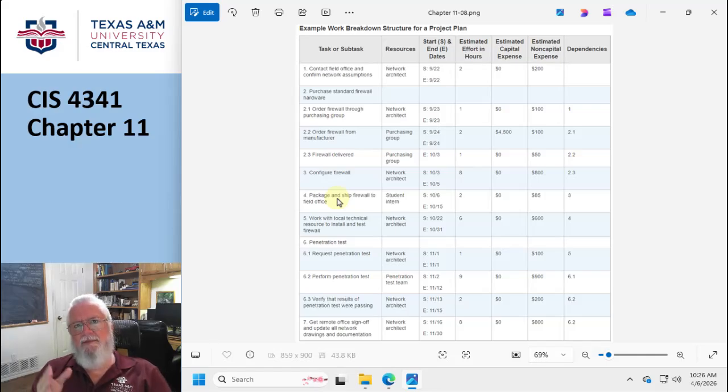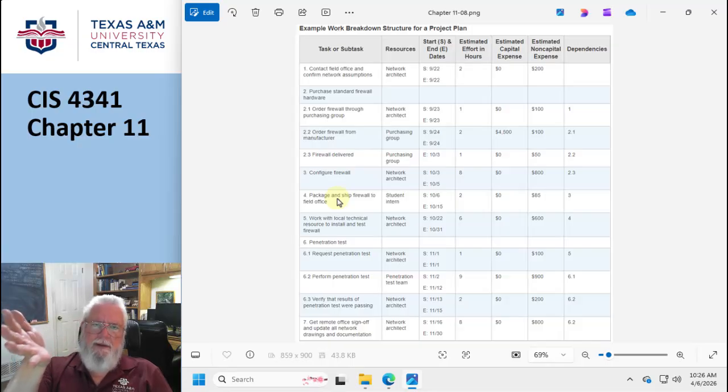Okay, so this is how you do a cost estimate. If I know the number of hours, and I know the skill levels implied, their salaries, I can go up and say, okay, I know exactly what the material costs are. I know exactly what the labor costs are. Therefore, this WBS is going to cost me this amount of money.